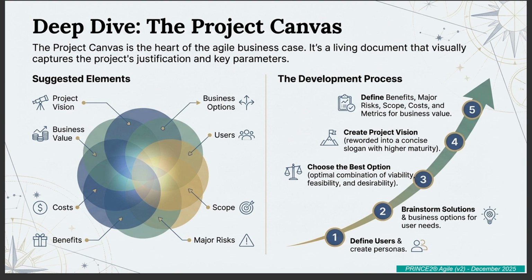Then come the practical constraints, scope and costs. Scope covers everything: time, tolerances, sustainability targets, features, and dependencies. And as we said, it must include that explicit definition of the MVP. Costs has to be comprehensive too. Project costs, yes, but also operational and maintenance costs, funding sources, and any early revenue you expect from incremental delivery.